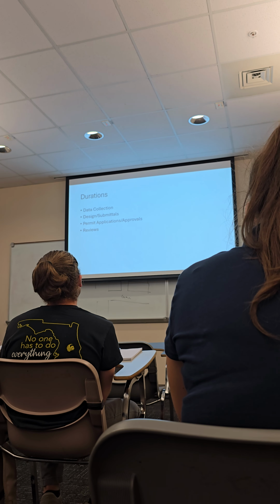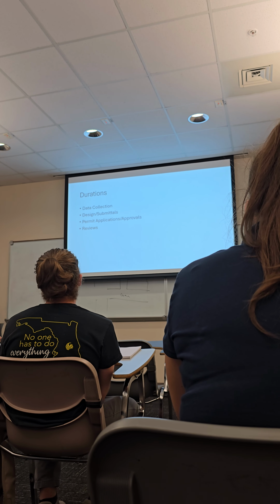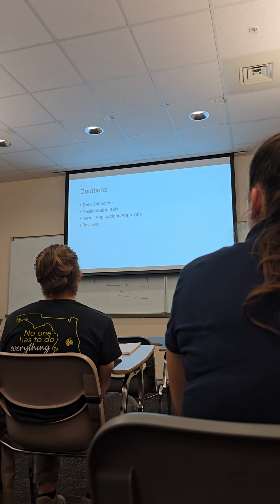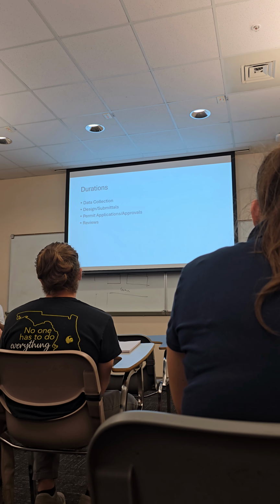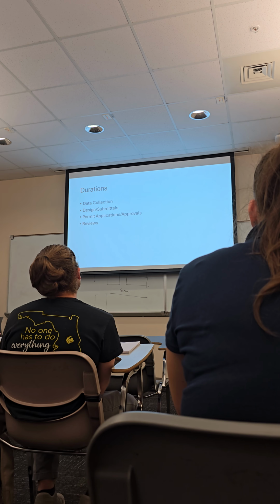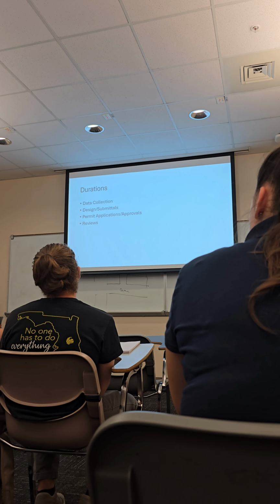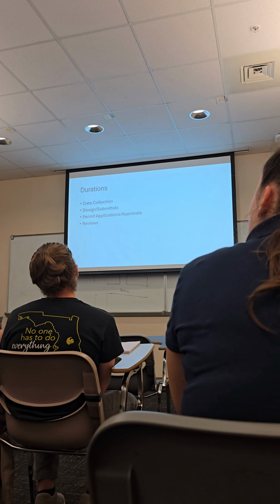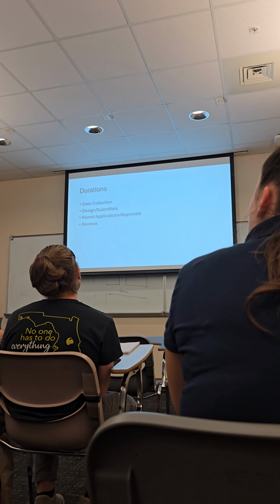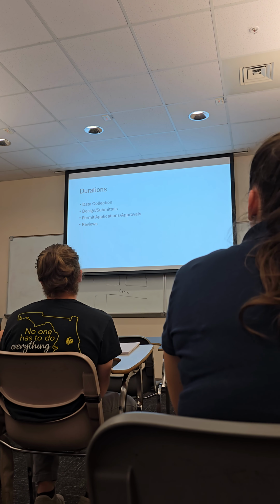And typically, if you're working with a geotechnical engineer, it would likely be a different engineering firm, but you would work with them to figure out what that duration would be. Same thing with survey. You may also, the environmental data and so forth. Same thing with design submittals. How long does it take to prepare? And how long does it take to review? And then there could be other reviews as well. So that's kind of it in a nutshell, kind of broad-based.